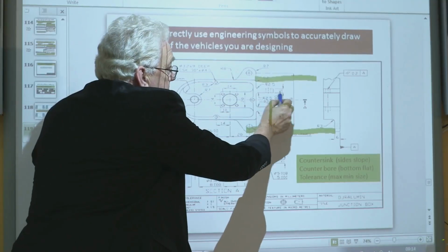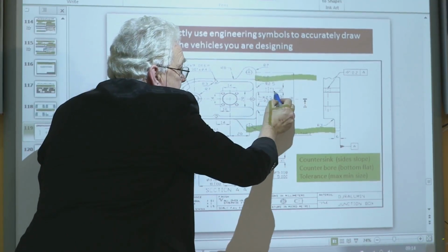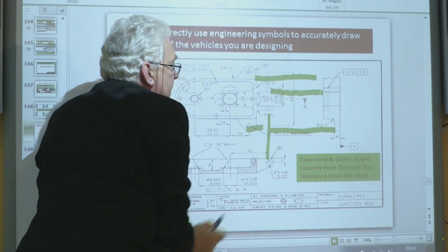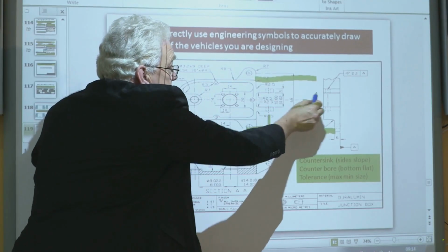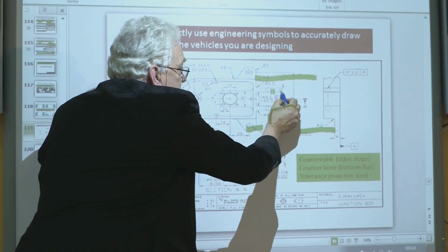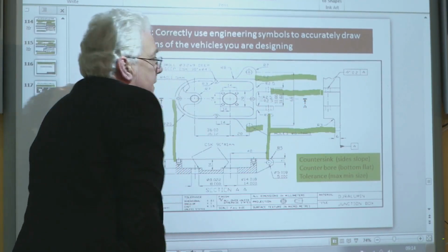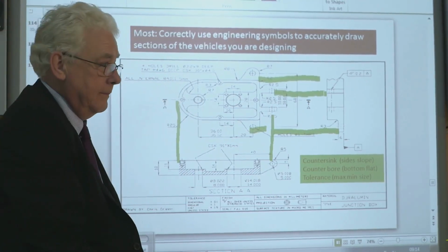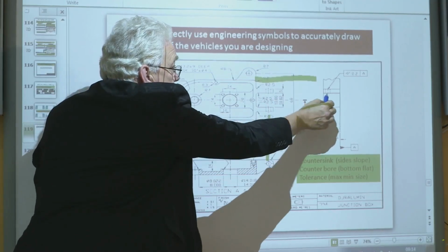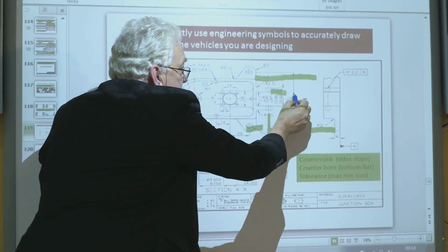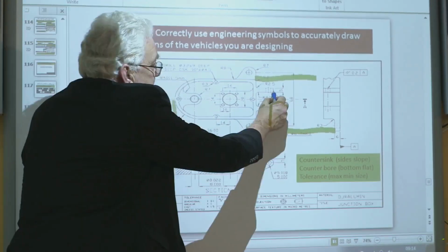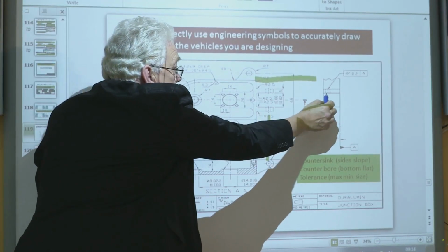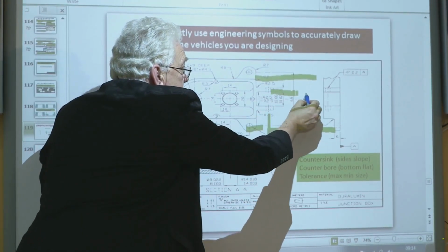You'll encounter budgets in 3 different formats, and you need to understand all 3. The top sheet is your summary of major categories, perfect for investors who want the big picture quickly. The detail budget breaks down every single line item. This is what you'll use during production for day-to-day management. And the one-liner gives you a single-line summary per category, useful for quick comparisons and proposals.